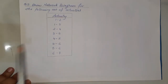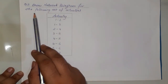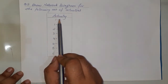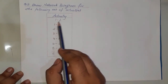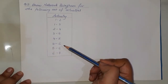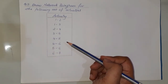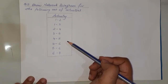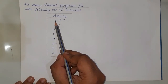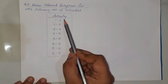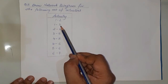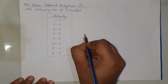Question number five: draw a network diagram for the following set of activities. Here the activities are given in the form of numbers, and the numbers represent the events, so they are directly given as activities based on events. Starting off, from event one, event two is released, and from event one, event three is also getting released, so we start with event number one.